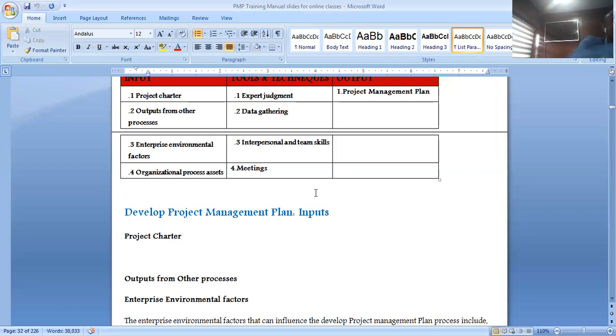Okay, just preliminary, just touch everything in the project charter. Yes, everything in the project charter will be captured in detail. Now, how do you detail that? That is why the project management plan will not be complete until you go down. You must have a scope for it. You must come up with a scope management plan. You must have what? A schedule management plan. So all these are subsidiaries of the project management plan.